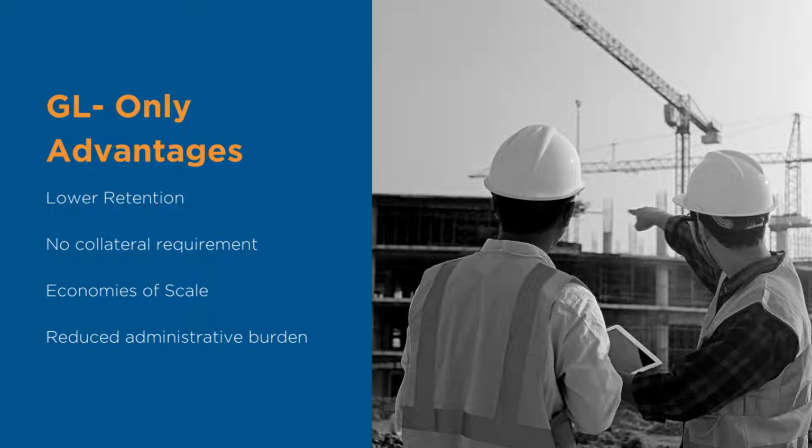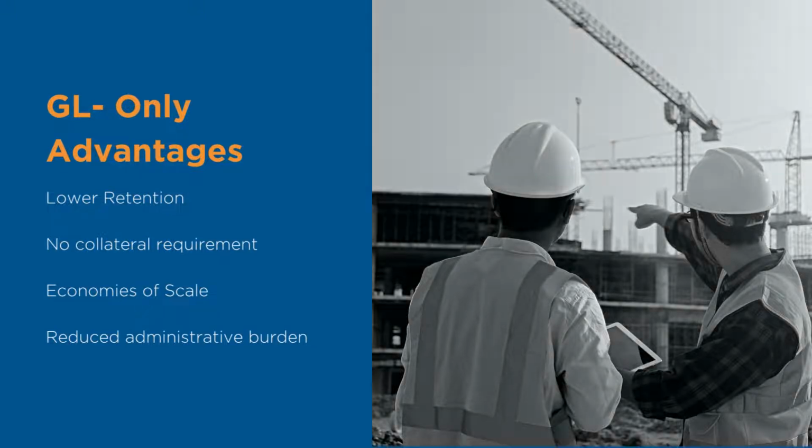The GL-only CIP structure has unique advantages. They have the benefit of a lower retention, in some cases as low as $50,000. There's no requirement for collateral, and GL-only CIPs have a reduced administrative burden to the sponsor since contractor enrollment does not require the tracking of payroll.